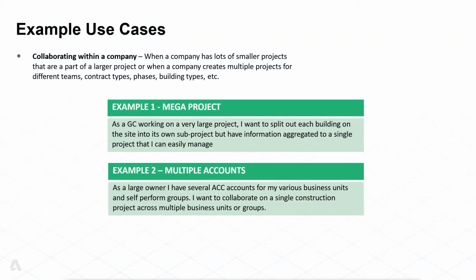And there's sort of 2 examples here, one being a mega project, where a GC is working on a large site with multiple buildings going up, and they want to treat each of those buildings as its own sub-project, but they can then use Bridge to help aggregate all of the data, all of the sheets, all of the information, and bridge that, share sheets, share files with a centralized project to make managing the overall site much easier, while allowing each of the individual project teams working on each of their buildings all the data and everything that they want in one centralized place as well.